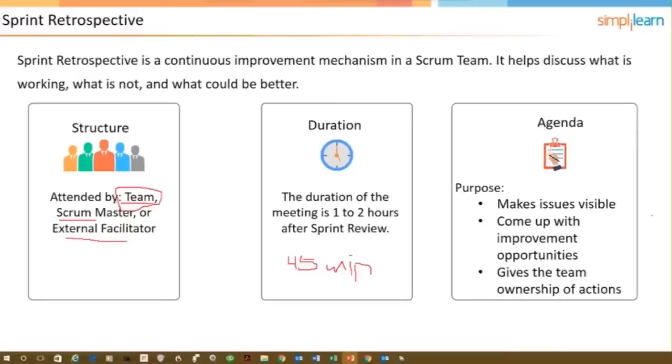And what's the purpose? There's the agenda for the retrospective, three questions. What worked well? What did not go well? What are we going to do different? And it's not just a chat session. Well, that would be part of it. You will use tools and techniques, like some that I mentioned, control charts, Ishikawa diagrams, five whys. There's a number of things that you might use in order to surface assignable causes for issues so that we could then come up with a resolution to those.